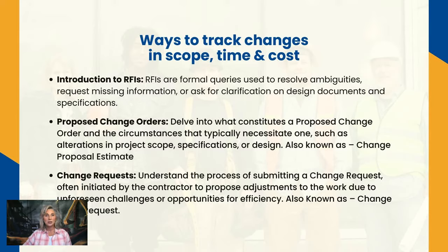So now the contractor is going to, on their document, identify the RFI number and send back a proposed change order to the construction manager and let them know that the resulting resolution provided by the architect is going to be an increase in time or money to the contract. And so they are submitting this proposed change for this amount. Okay, then once that is reviewed, and if it is approved, then it moves to a change order.